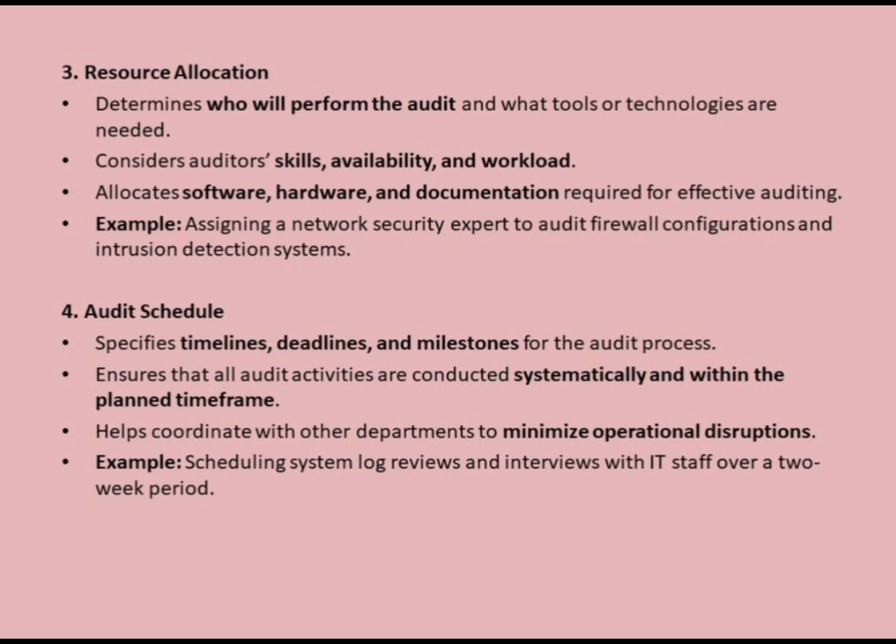Example: a 2-week audit of an organization's IT infrastructure may include Day 1-2 for network configuration review, Day 3-5 for server log analysis, Day 6-8 for database and application checks, and Day 9-10 for staff interviews and documentation. This structured approach ensures all components are reviewed efficiently.